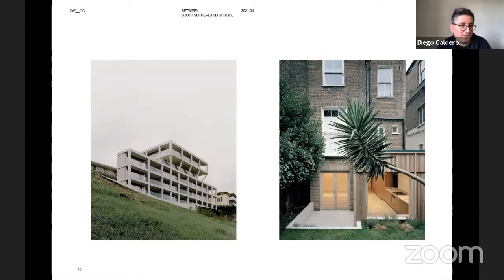And then we realized that the facade elements, as a building built in this day and age, will probably go for 30 years. It depends on many factors, but these are the values that we have considered and used. And once one is inside the building, it's probably more something like 10 to 15 or 20 years that the elements within will probably, for more than one reason, need to be replaced or modified.